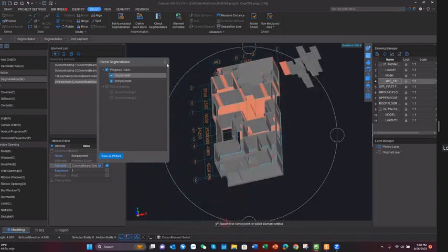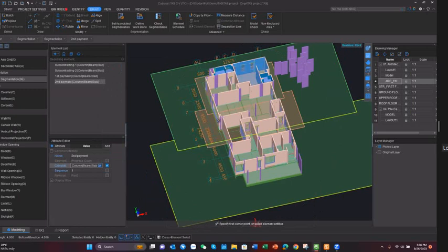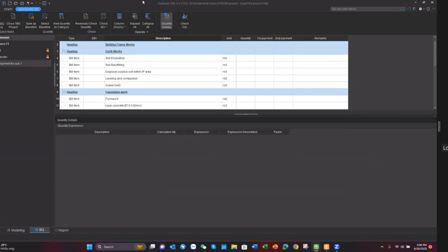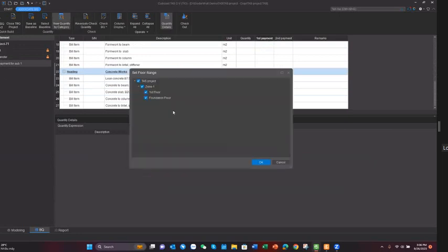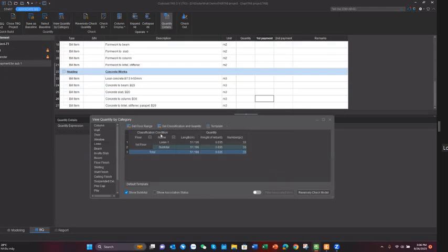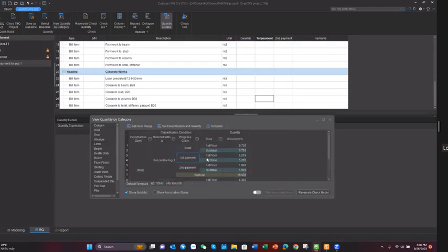And you can also link the quantity to your POQ. For example, if I move to the POQ part, I want to link the quantity of column. We had a first payment and second payment for subcontractor 1. So I click first payment first, and then view the report. With the column, we have the first payment here for subcontractor 1, and with the second payment, we also have the quantity in here.